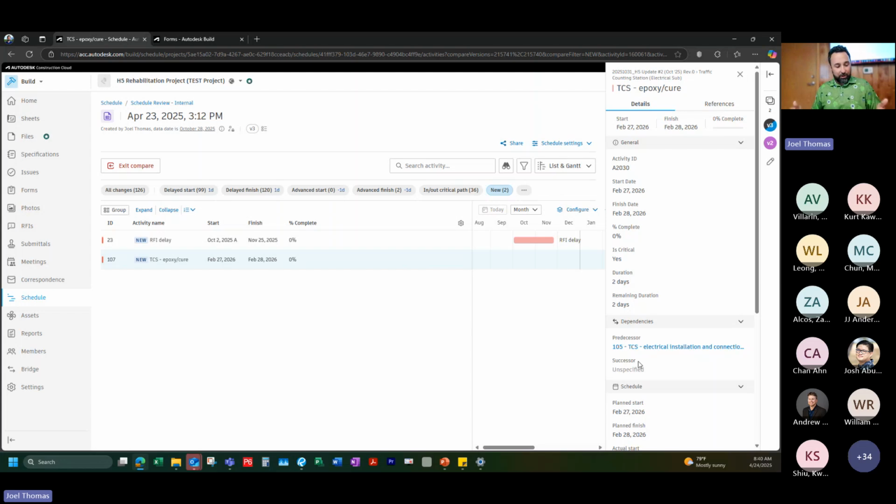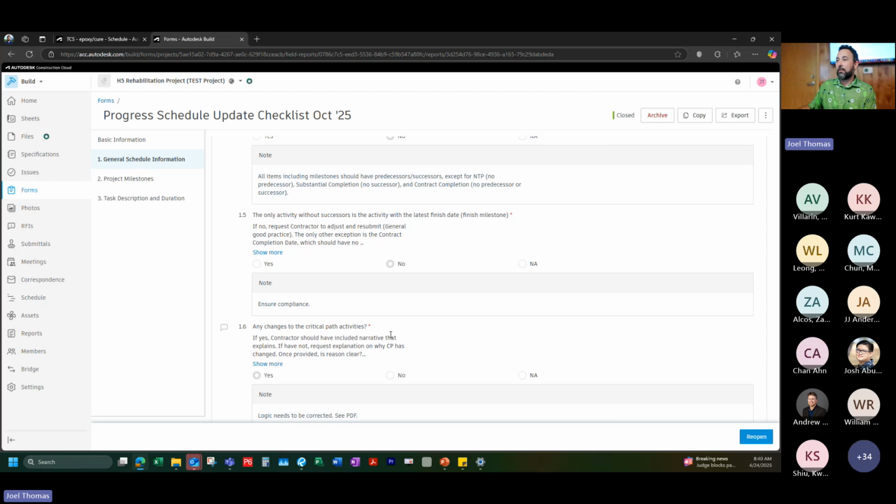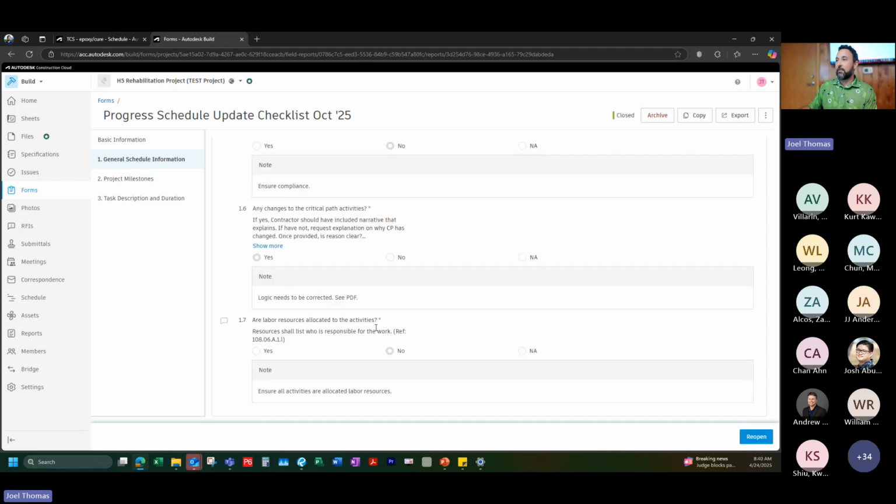Your start work wouldn't have a predecessor, right? And your substantial completion wouldn't have a successor. So basically, everything in between should be tied to something so that your schedule logic works correctly when you're progressing your schedules. So this is why we like to make sure that there are predecessors and successors for all those activities. That's another comment I would make here, to make sure that we include those new items, particularly to have those successors and predecessors.